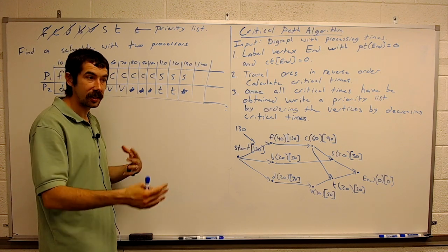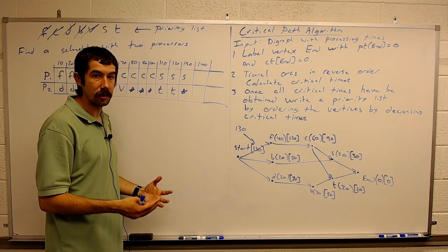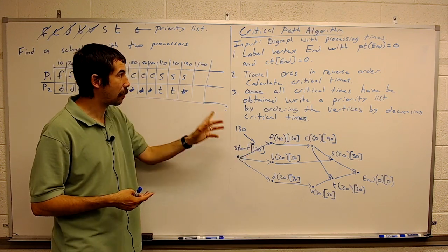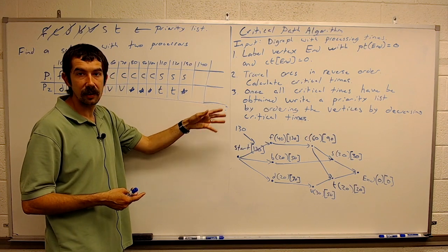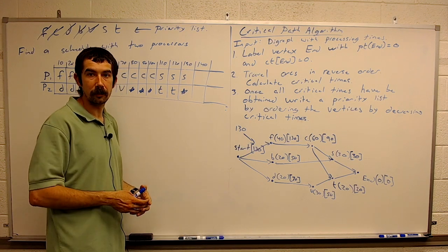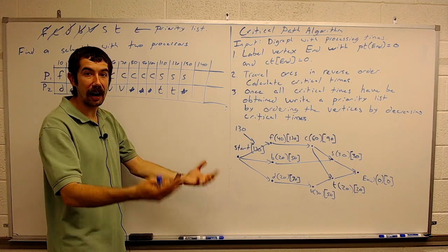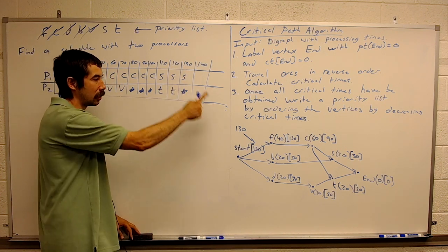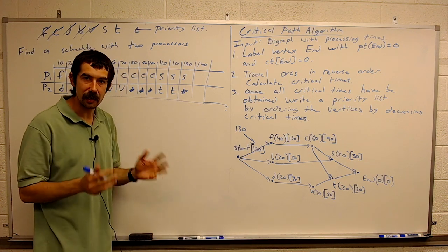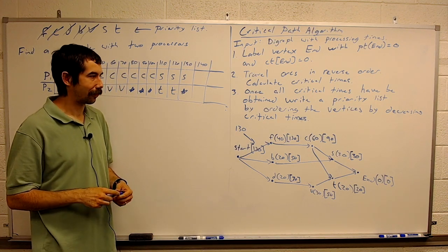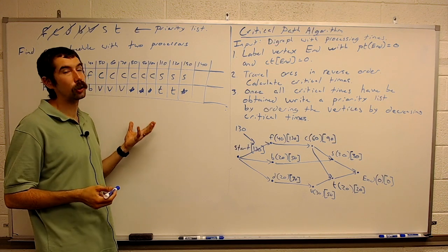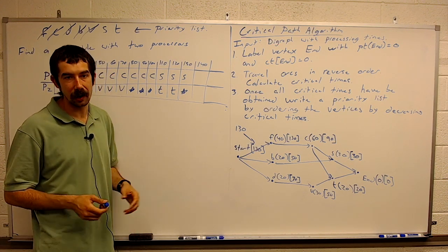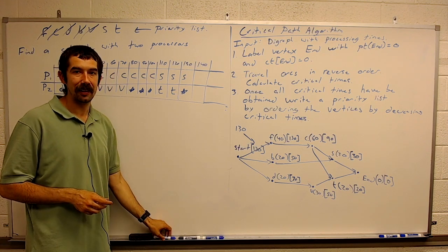There are going to be some scenarios where 2 does not hit the critical time of start. Maybe you'd end at 150. And then you would want to try with 3 people, or 4 people, or 5 people. But in this case, since we got 130 matching the 130, this is the best case scenario. I guess we technically could try to do it with 1, but it's not hard to see that it's going to take way more than 130 minutes to do it with 1.